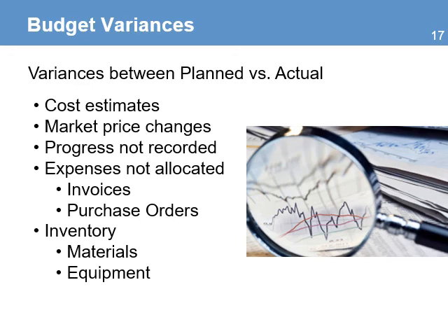Another reason is when expenses are not allocated properly, especially in invoices and purchase orders that take too much time to be reported. In this situation, the project manager could believe there is still money available in the budget and authorizes more expenses. Another factor is when the inventory of materials purchased by the project is not taken into account when calculating earned value. Earned value is calculated for all the activities that are completed and doesn't consider the money that was spent in goods that are stored in a warehouse.